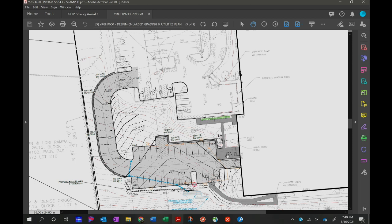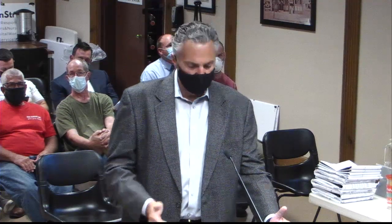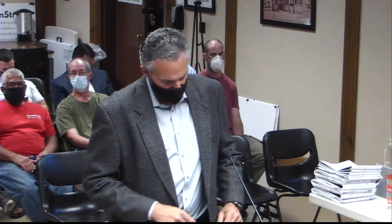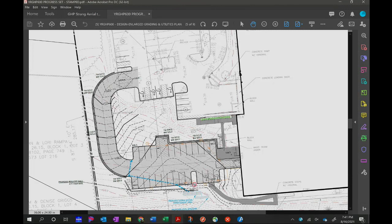So they've accomplished a good amount of the fill that you're showing here. Is that fair to say? No, not at all. They did very little regrading of that area to build the construction road. It's for construction vehicles, so they don't need to meet grades and code requirements for slope and whatnot. So very little was done in the way of reshaping existing grades. They needed to fill a little bit. You want it level. You don't want the access road sloping to one side. But nothing has begun for the grading that would be required for this parking lot.